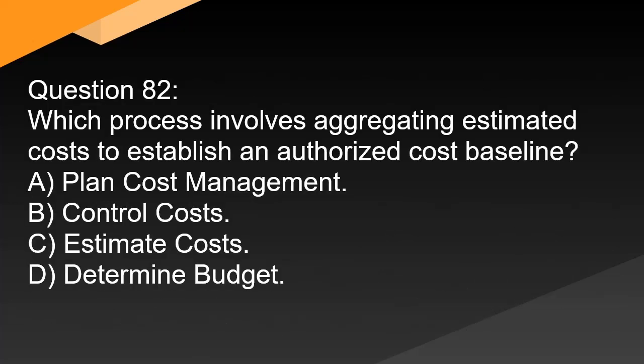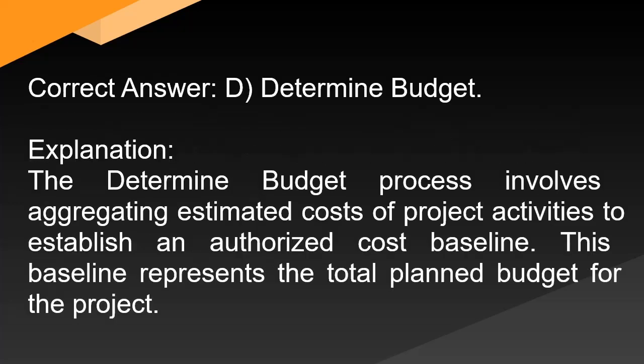Question 82: Which process involves aggregating estimated costs to establish an authorized cost baseline? A. Plan cost management. B. Control costs. C. Estimate costs. D. Determine budget. Correct answer: D. Determine budget. Explanation: The determine budget process involves aggregating estimated costs of project activities to establish an authorized cost baseline. This baseline represents the total planned budget for the project.